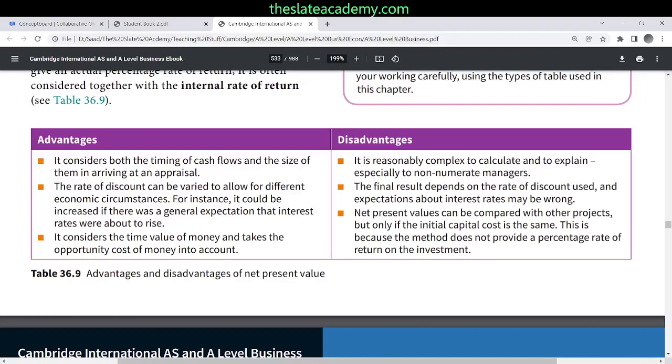This problem can be slightly overcome by using the same model with different discount rates. For example, I've got a project. I will say, what if the discount rate becomes 20%? And what if the discount rate becomes 15%? Then I can run both these scenarios and I will know that it would be at best in between these two extremes, because I calculated the net present value for the project using different discount rates.